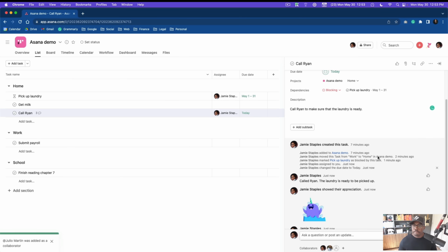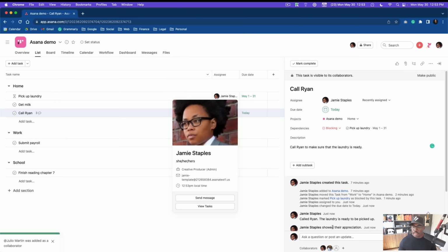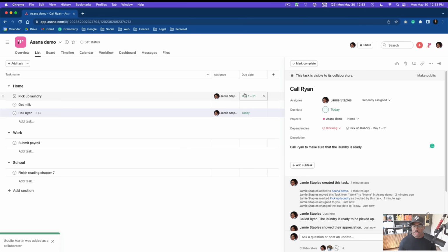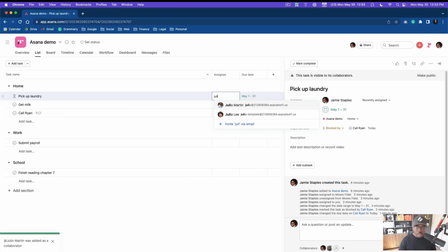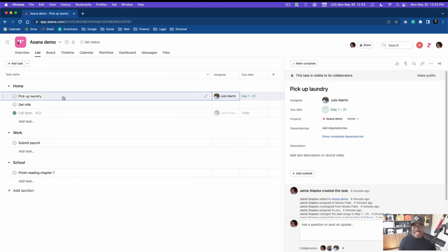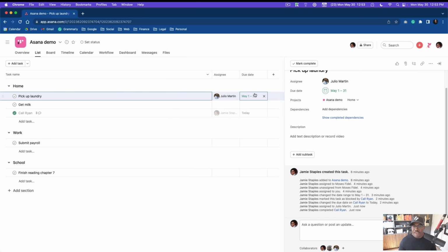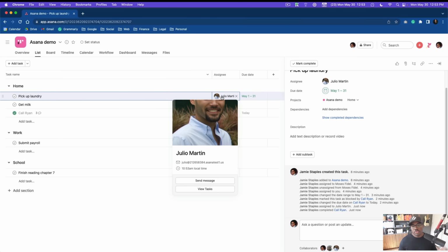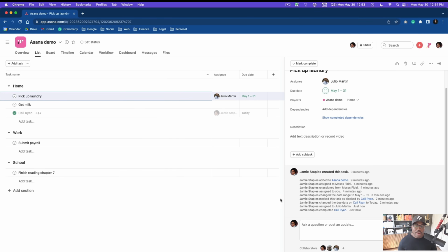And then great. So now let's say, who did I assign that to? Julio Martin. Let's see. There we go. So now what's going to happen is I'm going to complete this task just like that. And you're going to see that this hourglass has disappeared, and now it's ready for Julio to actually work on. And what's really cool is that in Julio's My Tasks, he got a notification that said, hey, this is ready. It's unblocked. You can go now and work on this task.